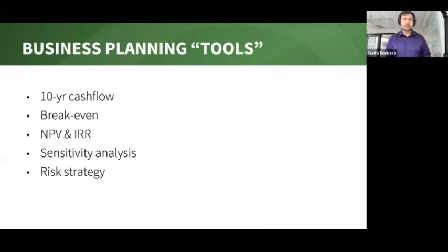Like if you have one supplier and all of a sudden they want to mess with you, will that jeopardize your project? Long story short on that one, we're always looking for alternatives. In that risk strategy piece, a big piece that we always look at is, when we're building a biomass system in communities and creating the supply chain, there's no business in their right mind that would ever make an investment in something and have one local supplier. And so it's so important to diversify your supply alternatives.